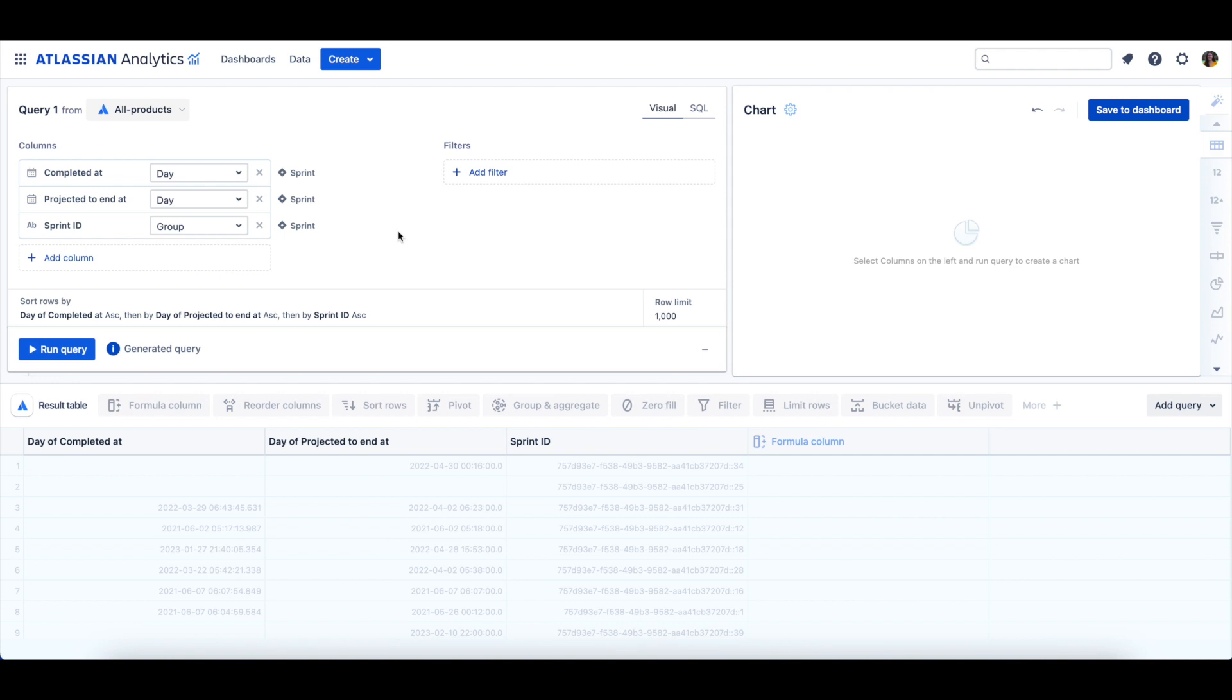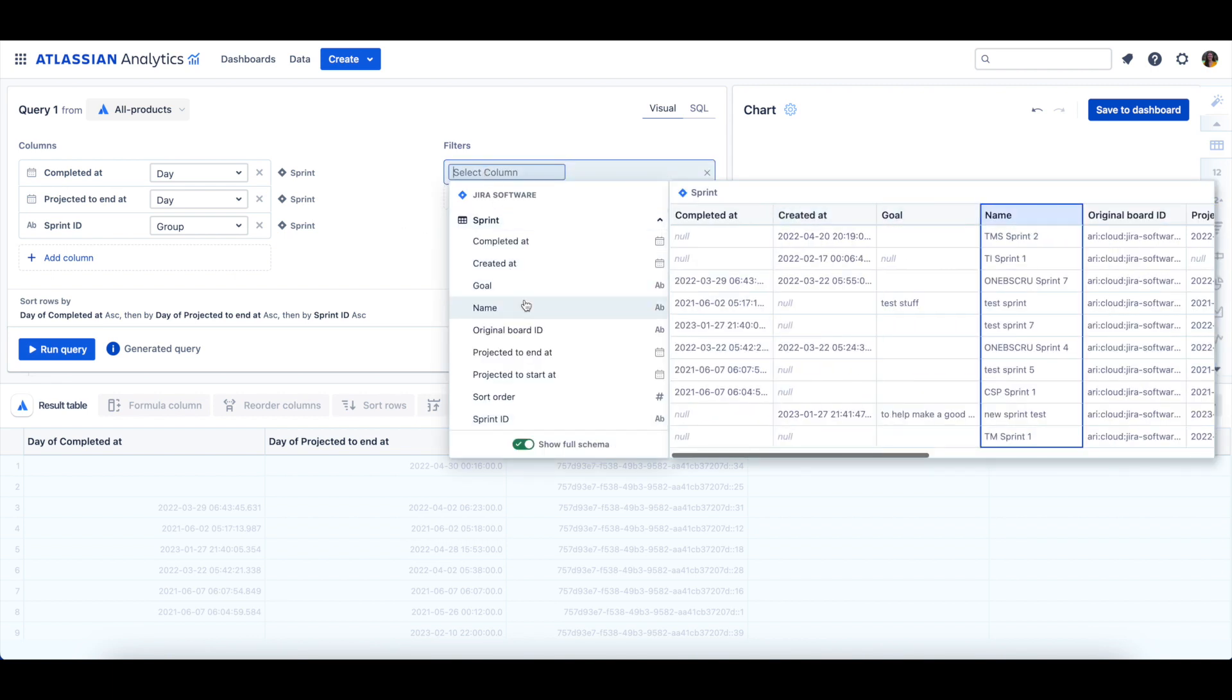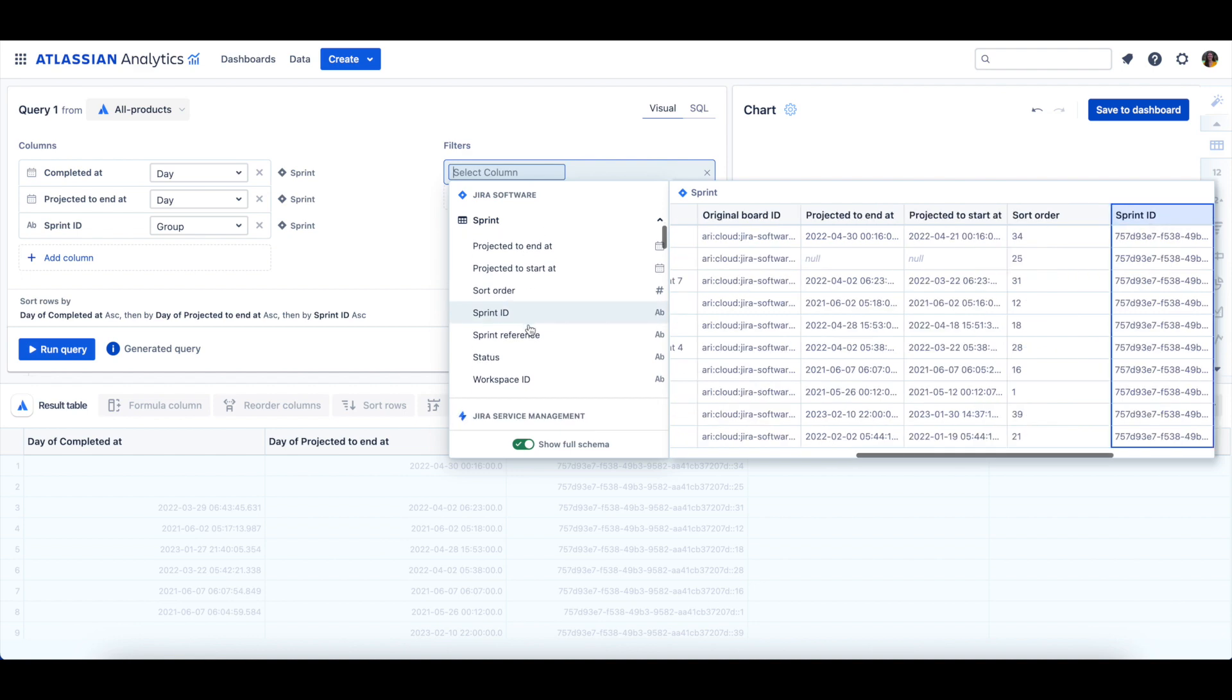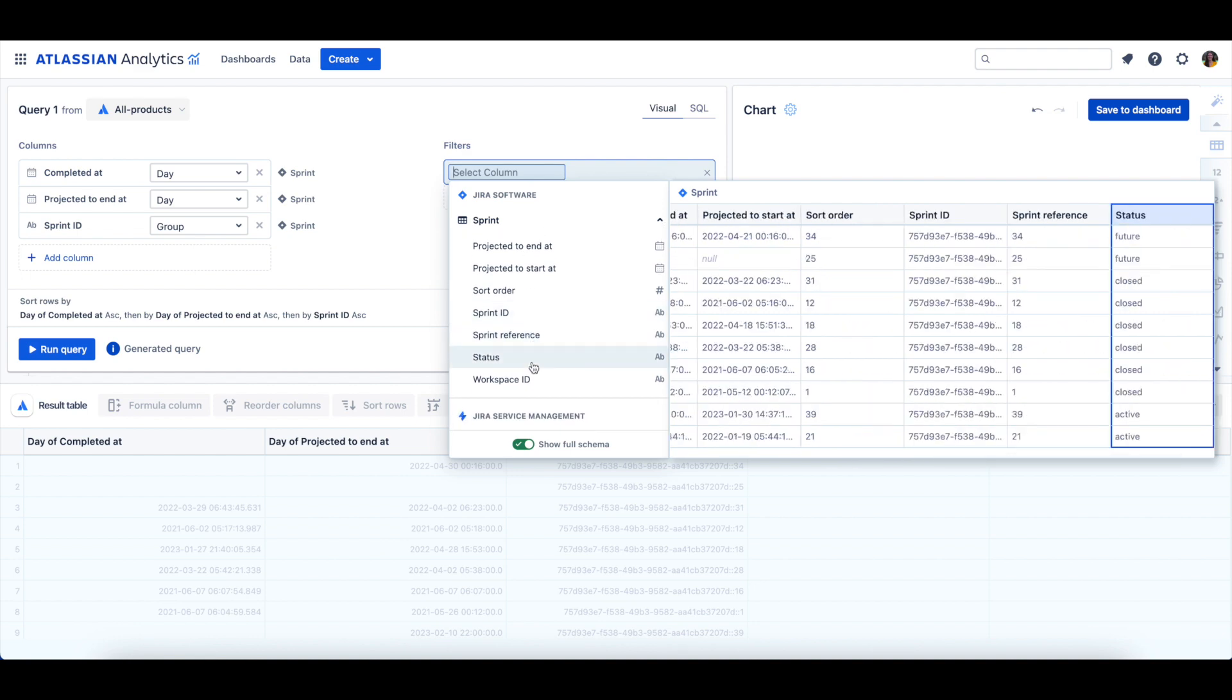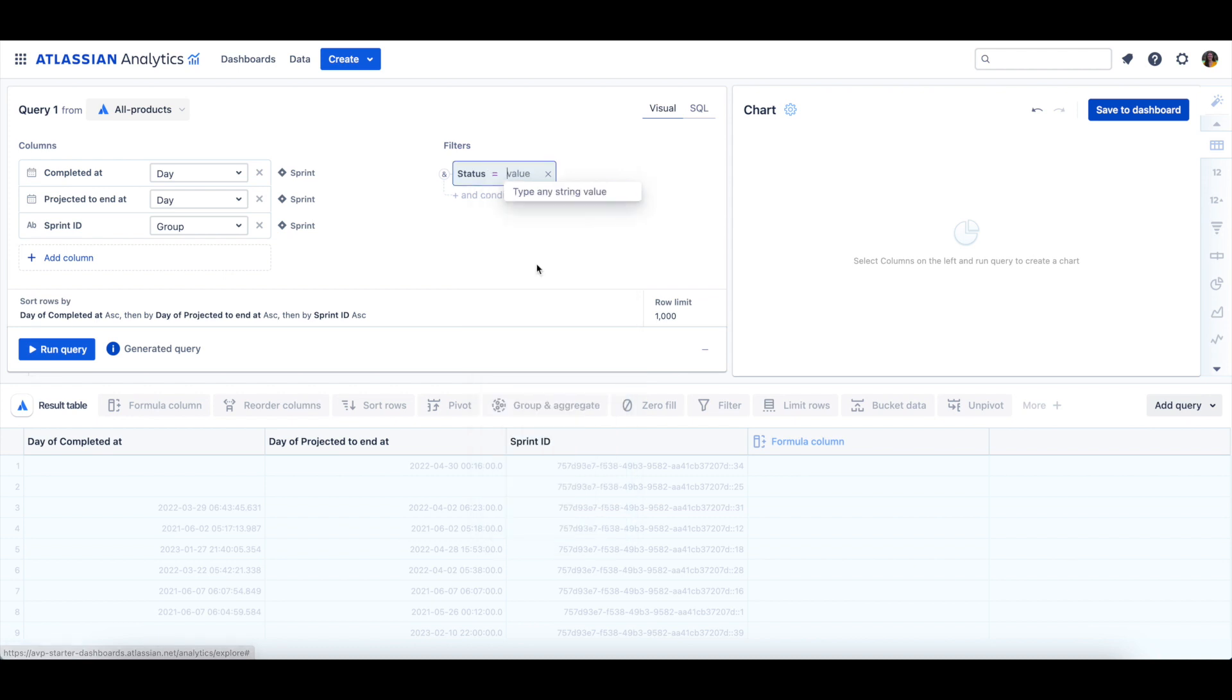Next, we need to add a filter to our query so our data only looks at the closed Sprints. To do this, let's select Add Filter, and we will then select the Status column from the Sprint table. We'll use the equals filter operator, and we'll type closed.